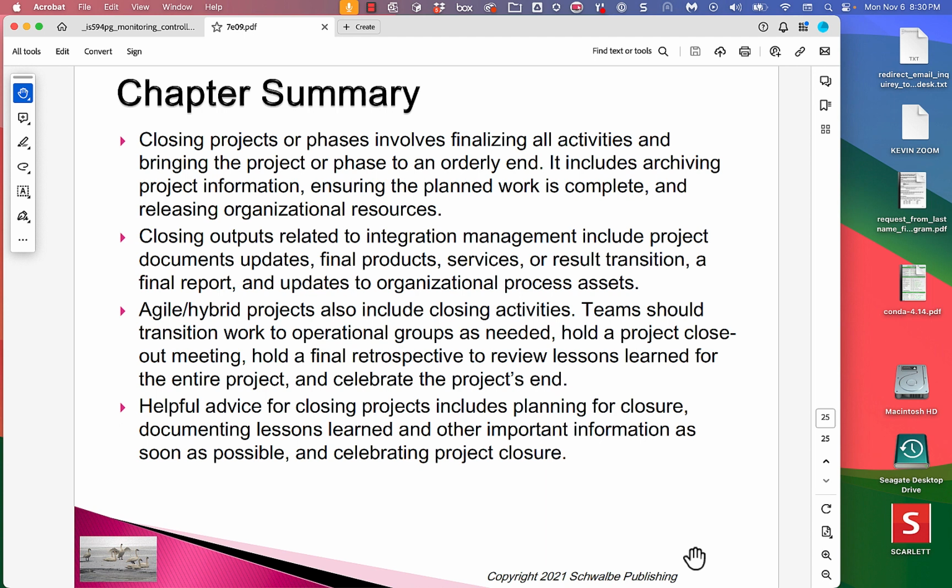You want to make sure that any notice that has to be sent to the other side has been sent. Things have been paid for. If you have to provide a list of defects to be corrected, you sent the list of defects. Contracts typically have some length of time that you have to notify the other side that you want them to act on something.